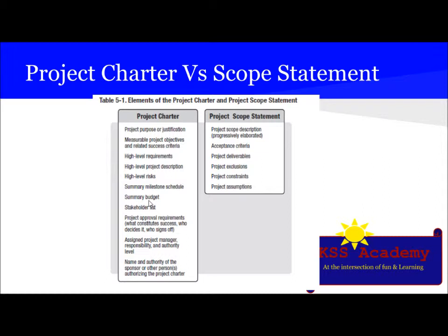In the case of expert judgment, expertise by a group or a person with specialized knowledge is used. In the case of alternatives generation, the techniques are brainstorming and lateral thinking, not step by step thinking but random, outlandish, and challenging ideas. Analysis of alternatives is done, and value analysis is done, providing the lowest cost of the product or service without loss of quality and performance.